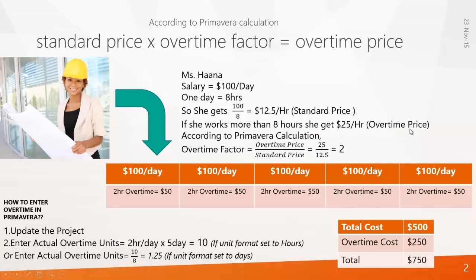So according to Primavera calculation, you can calculate the overtime factor, which is equal to overtime price divided by standard price — that gives you two. So you need to set the overtime factor as two for the resource Miss Hannah.